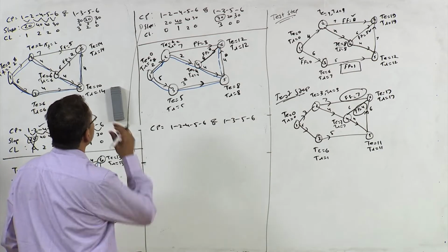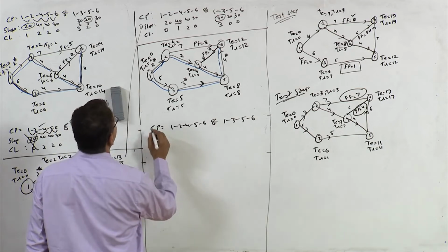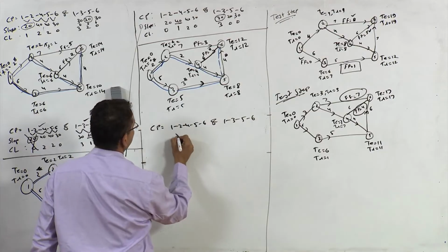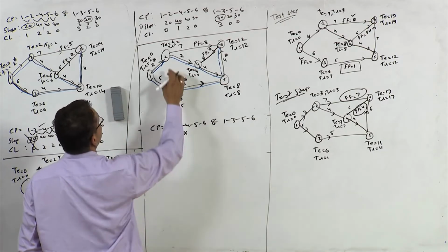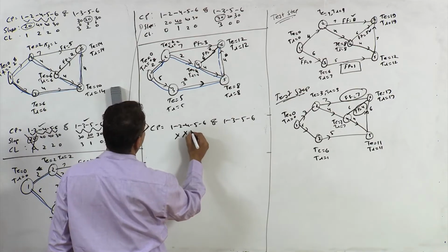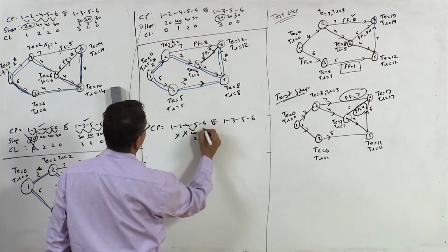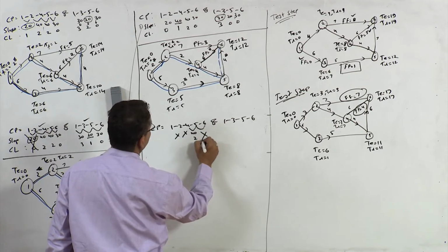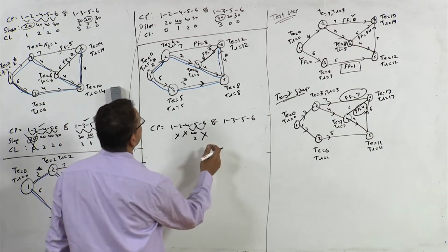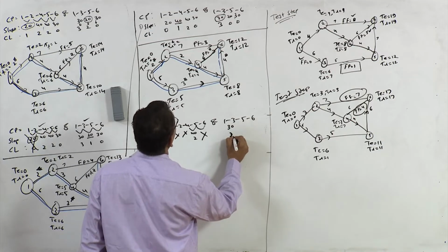So in fact, let me not write slope and crash limits for these two, because we have done this, we are done with this, because now crash limit is 0 here. So for 4 5 this is 40 and crash limit is 2. For 5 6 this is 0, right? You can't do it for 5 6 also. And in this path this would be now 30 and crash limit is 2.